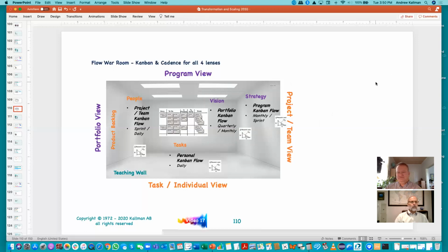board where we looked at deliverables over time. And this board had a couple key functions, not only taking a look at the history over time and forecasting where to go. We identified dependencies. So it got broken down into the different functions and who had to do what in the sequence and who their customers were. And we used strings to highlight those dependencies.